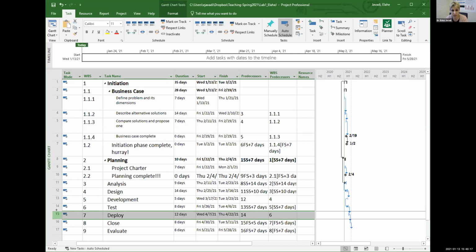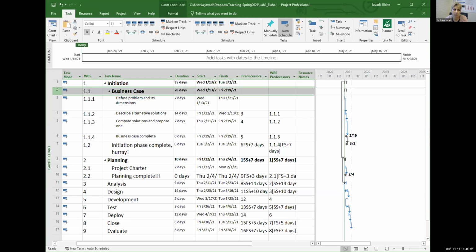That's what happens during the execution phase of the project lifecycle. You're actually creating an information system, and thus you follow the phases of the systems development lifecycle. Now, who remembers what goes under a phase? You were here on Monday. We talked about a deliverable-oriented work breakdown structure, and this is what you see in front of you. You decompose the big project into phases, like your classmate just said, and then phases into deliverables. And under deliverables, you list activities that help you produce that deliverable.